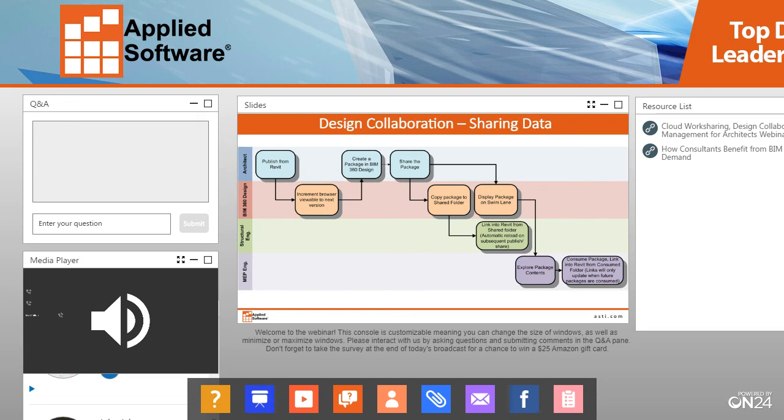When you set up your project, you have the option of letting BIM 360 Design set the folders and the permissions up for you using the teams that you create. Using those teams, it'll set up a logical folder structure with some default permissions. And usually, if you just go with that, you're starting off fairly good. You may have to make some minor modifications, but nothing major. You can set up your own folder structure, tell your teams to use whichever folders you want, and set the permissions up whichever way you want. It's going to cause more work on the front end for project setup, but more flexibility, and it may cause a little bit more adjusting to be done as you start working through the project.